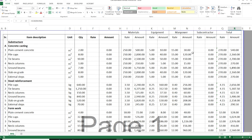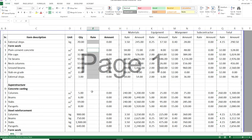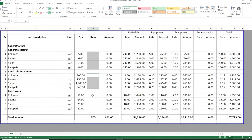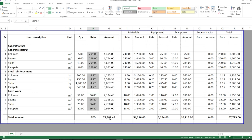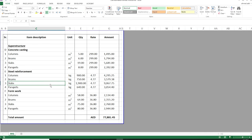This sheet is very useful because if I want the BOQ rate to equal the cost, I can take this total cost rate and apply it, or I can add, for example, 15% — so 1.15 times the total cost rate. I'll copy this and apply it everywhere. So I got my BOQ now at 77,000. I can select and hide the estimation columns, then print this as a PDF and submit my quotation. This will be your priced BOQ: you have done the cost estimation separately, added your margins of 15%, and you can print the file as a PDF.